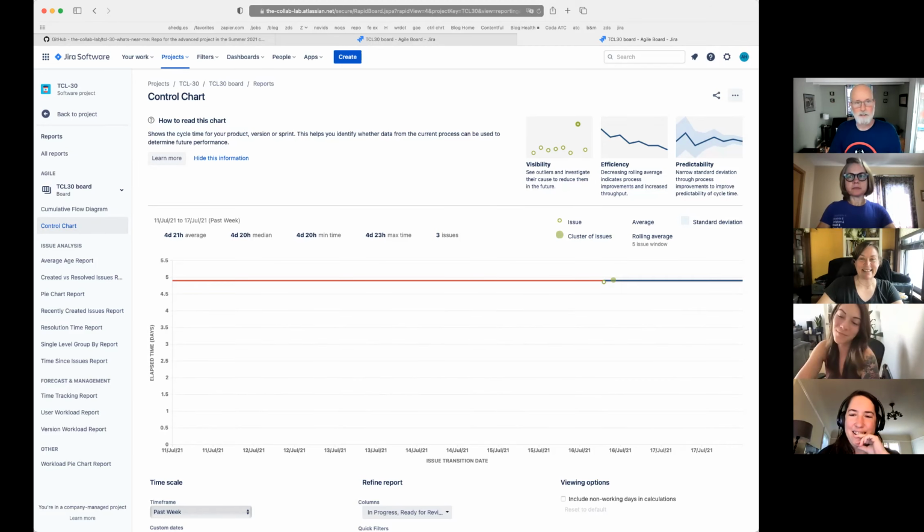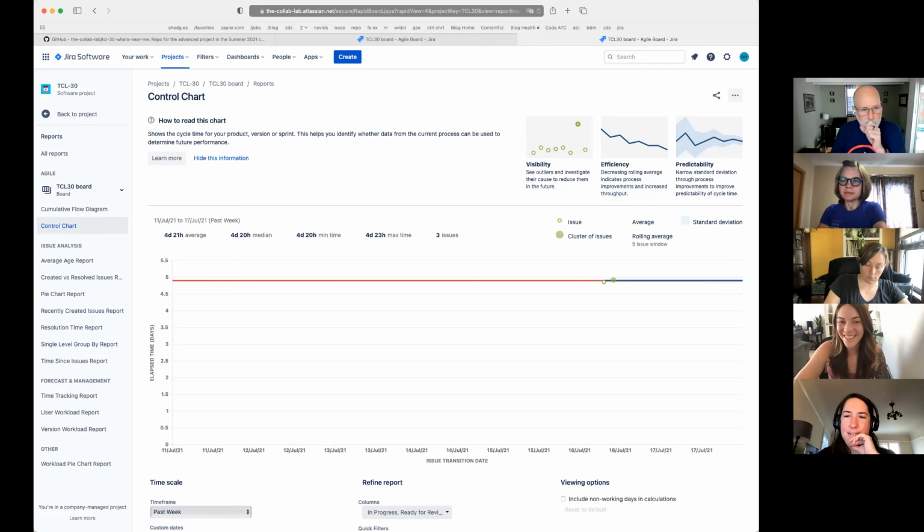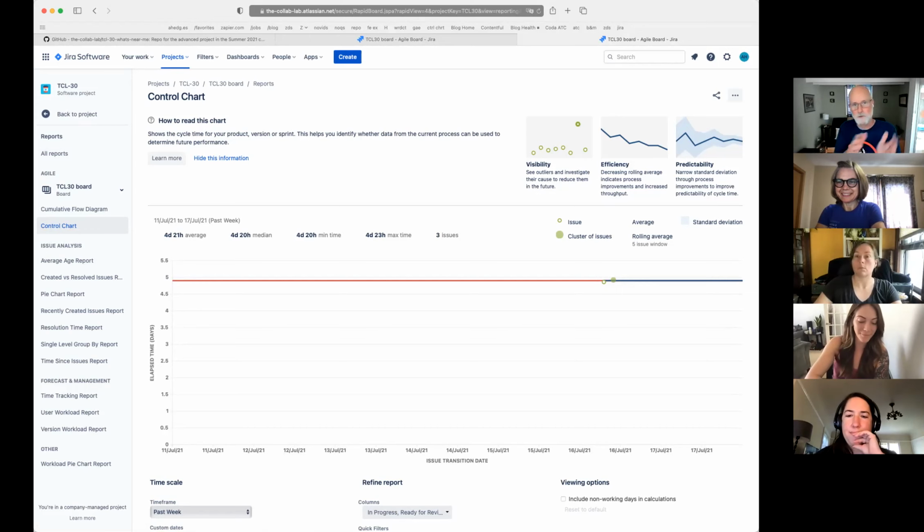Oh, okay. It is okay. We commonly exceed our limits on my and Stacy's team. But that's a good call out, and we could adjust the limit. So this is actually why the limits are helpful. I think the other solution would be for us mentors to get these things reviewed faster so we can move them through that stage. The limits on each column are really meant to surface issues and efficiency, right? So if we have way too many things in review, it does mean that, oh, come on, people, we need to be reviewing here.